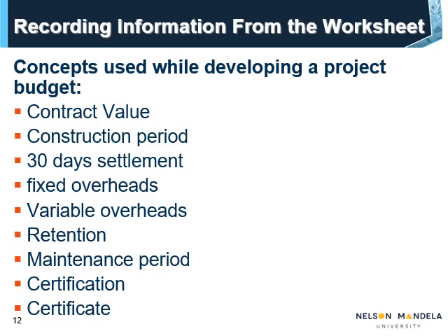Fixed overheads, these are overheads that a contractor will incur, whether he generates an income or not. Variable overheads, these are overheads incurred as a result of generating an income, or working on a contract. Retention, this is an agreed amount, usually a percentage of work completed for a certain period, deducted by the client as guarantee that the contractor will complete the project.